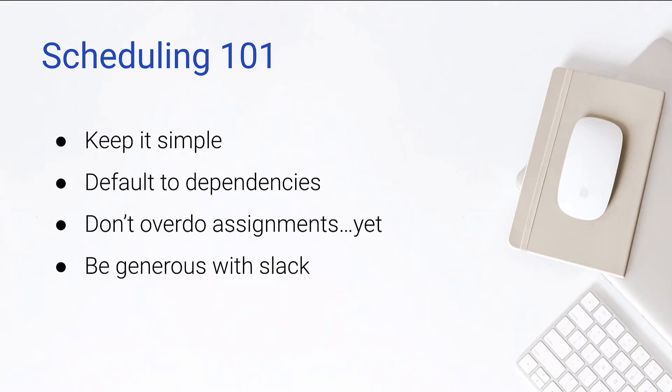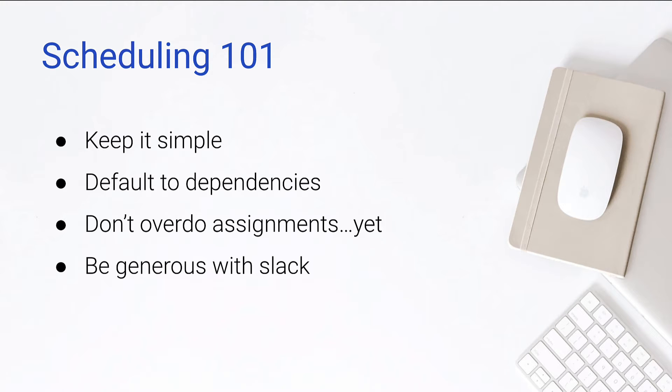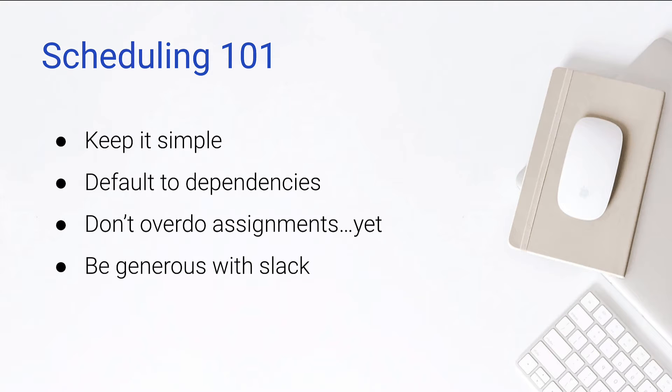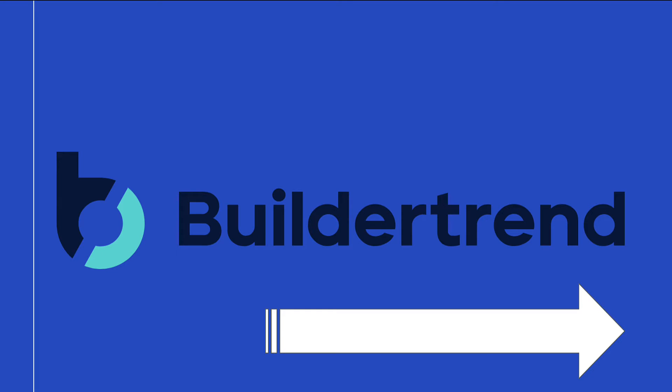So let's talk about scheduling. You're going to hear me say this a lot with BuilderTrend. And by the way, anytime that I say keep it simple, that's because I've made the mistake of making it complex in the past. Keep it simple. Default to dependencies that drives the bus. Dependencies are so important in BuilderTrend. We're going to talk about that. Don't overdo the assignments yet. So assigning to a specific person, a specific trade, we'll deal with that later. And be generous with your slack. So one thing that's always true with construction scheduling is that we think things are going to take less time than they actually take. So build in some slack, make sure there's room in your schedule.